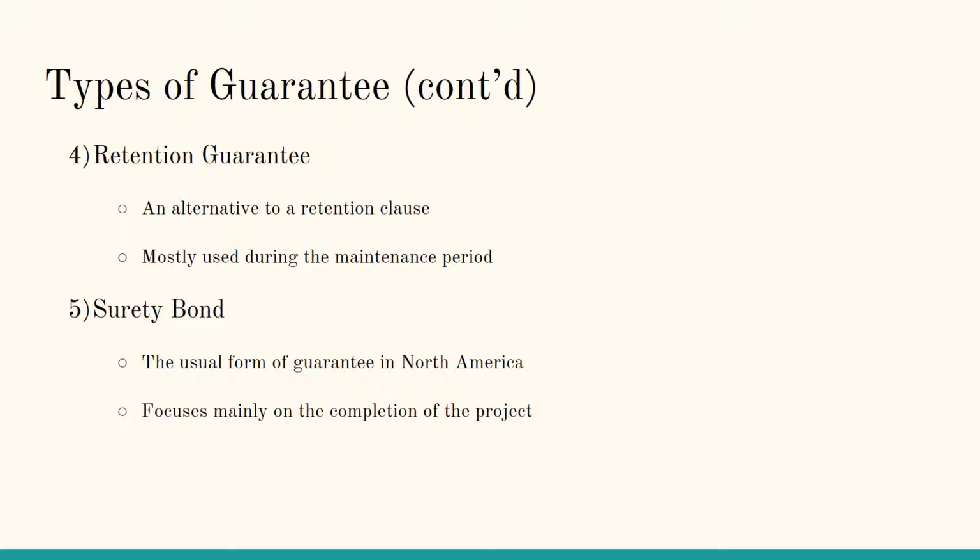A surety bond is the usual form of guarantee in North America. They vary significantly from the principle of indemnity. Rather than merely paying the amount of the bond following a default, the emphasis is on the surety organizing the completion of a project. A performance and payments bond is usually required on all publicly bid construction projects and may be required on some private projects.